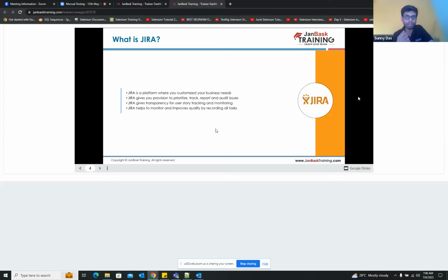If you are the only one who is going to work on that story, you need to provide your story point. If there is a team of 2, 3, 4, 5, or 10 members who are going to work on that story or task, then all the team members need to decide what the story point will be, and then it will be discussed in the sprint planning meeting, and then the story point will be provided to that story.